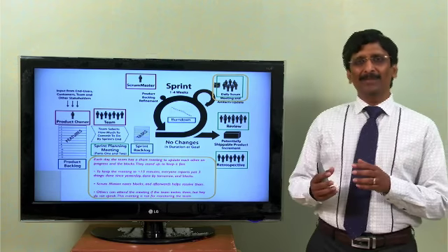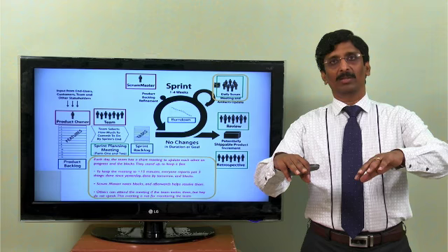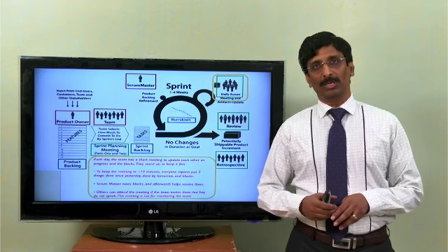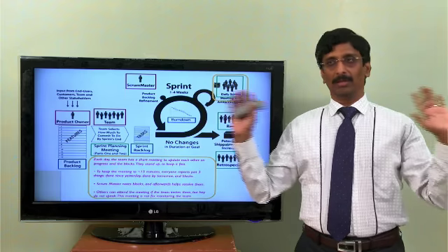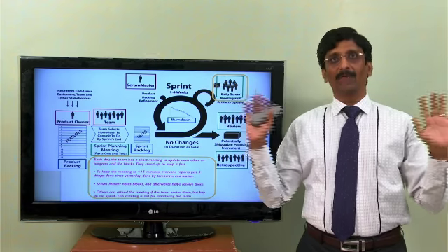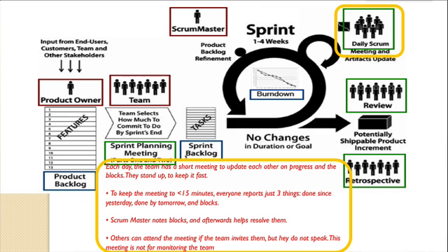They usually stand up primarily because if you stand up, it gets done faster. It's only a 15 minute meeting. If you sit so comfortably, it may not be completed in 15 minutes. So you stand in a circle looking at each other so everyone can listen to what everyone else says, and it does not go beyond 15 minutes. Within 15 minutes, you have to quickly update what you have completed so far, what you are planning to do tomorrow, and what impediments you have.